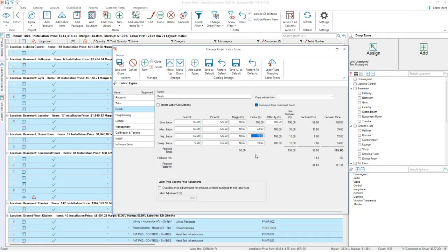If those numbers changed, if I had 10 techs and 2 project managers, that factor would double. If I had 15 techs and 2 project managers, it would be 2 divided by 15. Whatever that number is, that's the number I'm going to put here. Design is no different. In this simple calculation, this is the idea of a 1 to 10 factor between design resources and field resources.